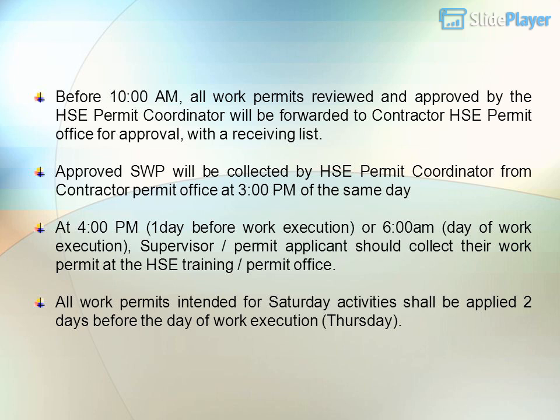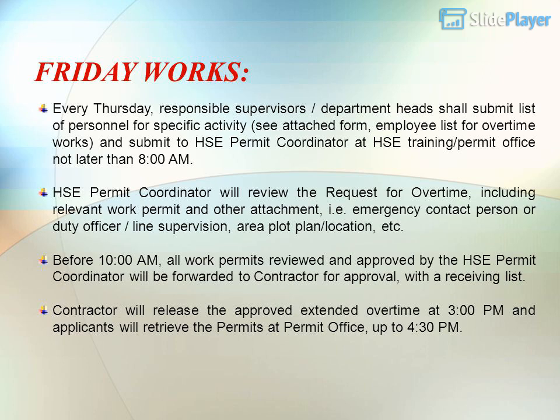All work permits intended for Saturday activities shall be applied 2 days before the day of work execution, Thursday. Friday works: every Thursday, responsible supervisors and department heads shall submit a list of personnel for specific activity, see attached form, employee list for overtime works, and submit to the HSE Permit Coordinator at the HSE Training/Permit Office not later than 8 a.m.